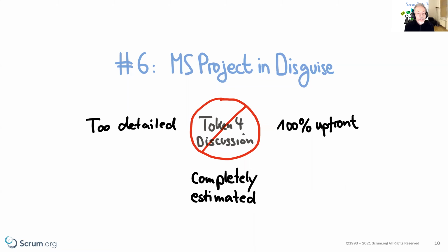So what I always do is I have a look at the product backlog, and I try to understand whether a large number of product backlog items was created in a short period of time at the beginning of the project or at any other moment. This is a clear indication that, again, somehow the intended purpose of the product backlog creation process, the refinement process, was really not lived up to by the team, for whatever reason there might have been. So that's another interesting point you can talk about with the folks on the team.